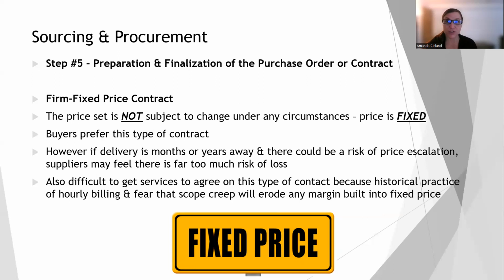There's also something called scope creep, where we say we want something, but then it keeps getting higher and higher and higher. And the concern from the supplier standpoint is if they agree to a fixed price contract and there is scope creep, they are not going to make any profit on that because it's going to cost them more to perform the services. So it's very difficult to get any sort of service supplier to agree to a firm